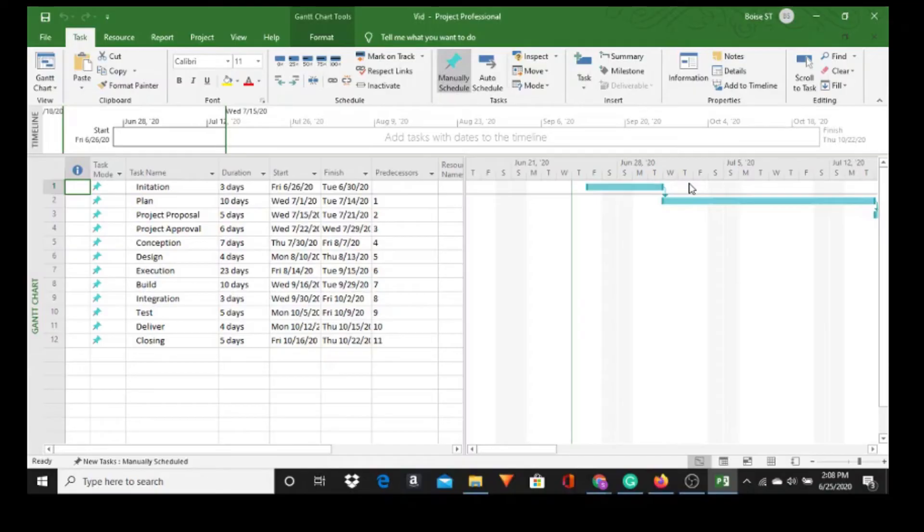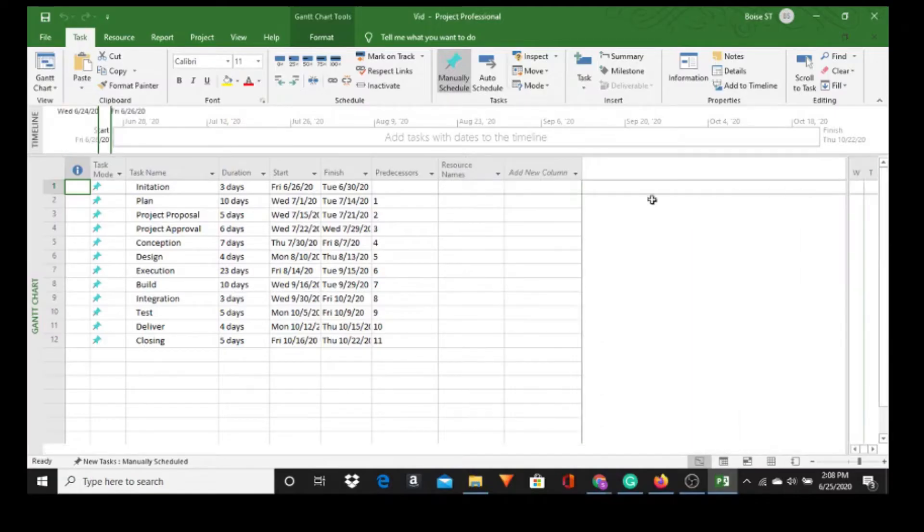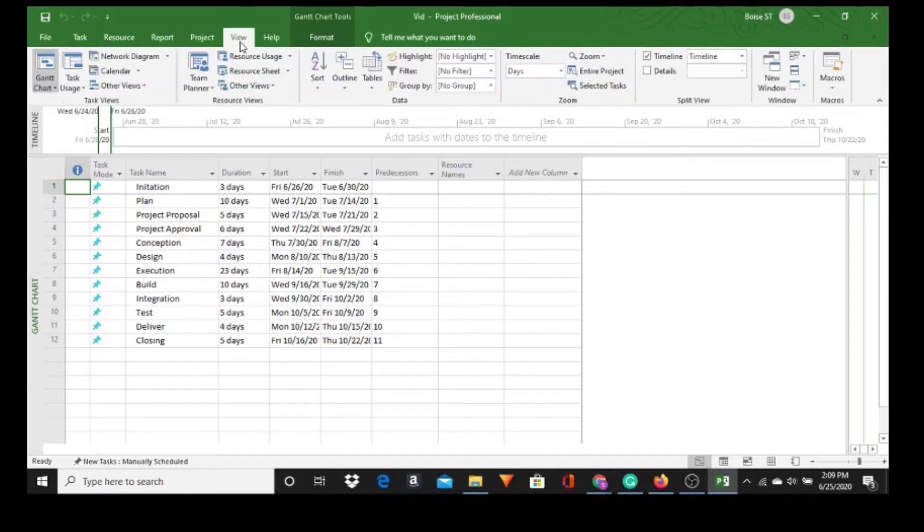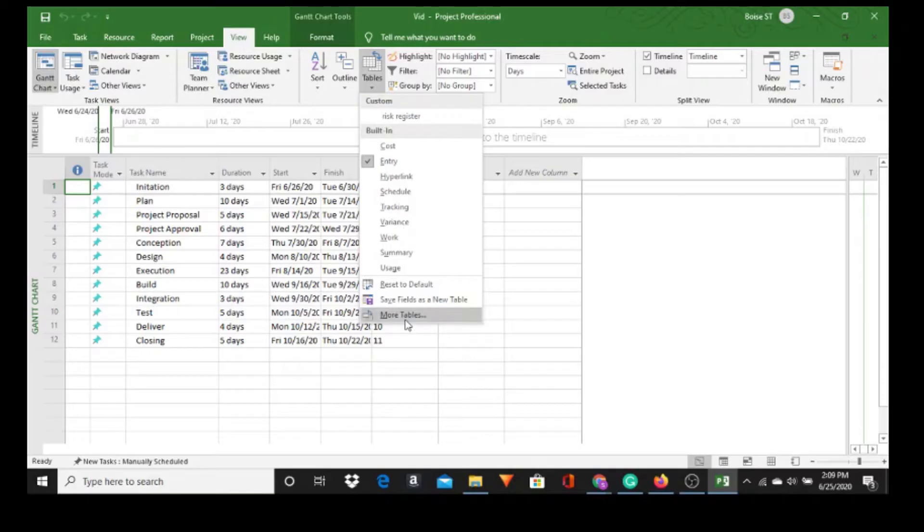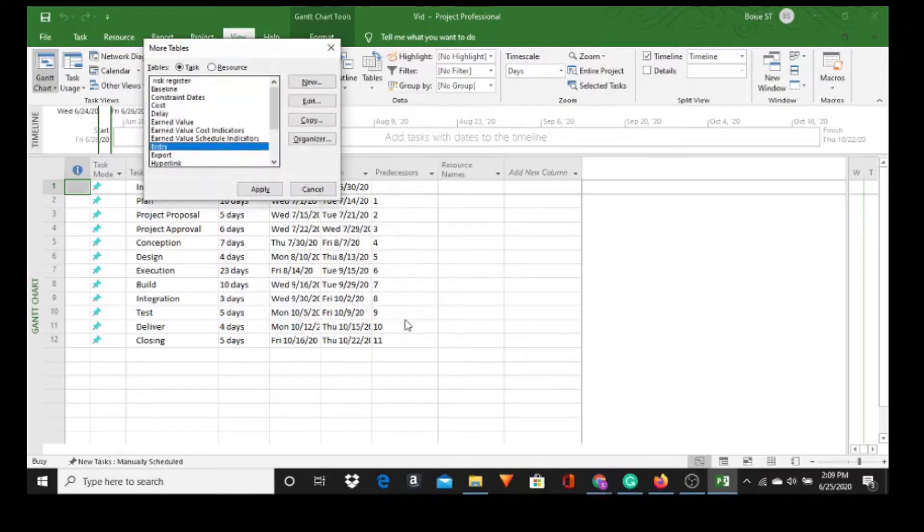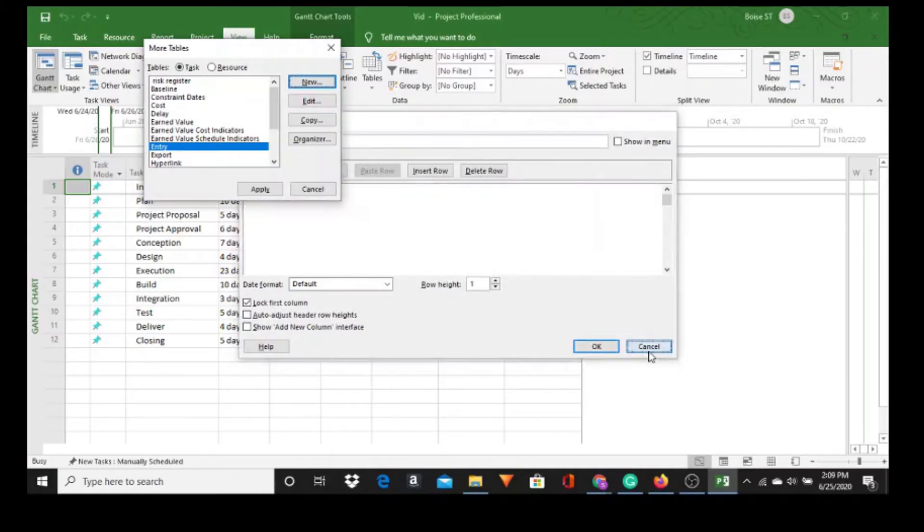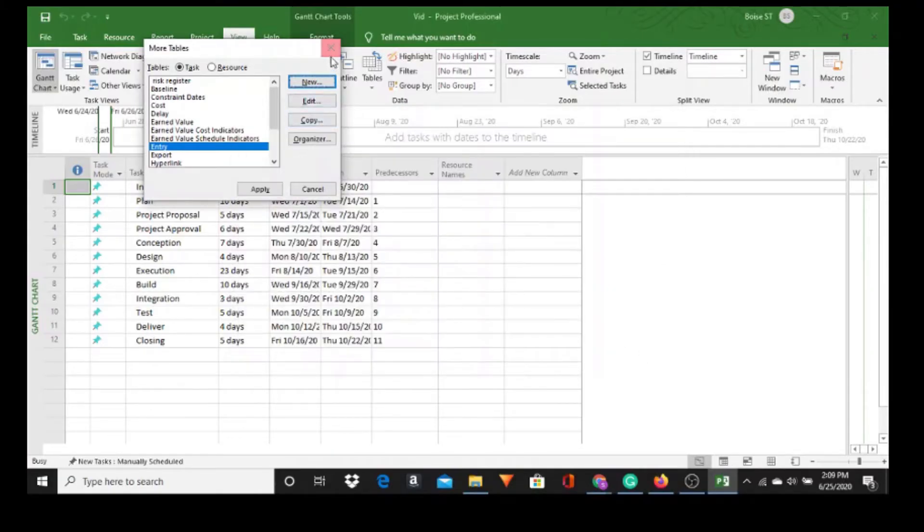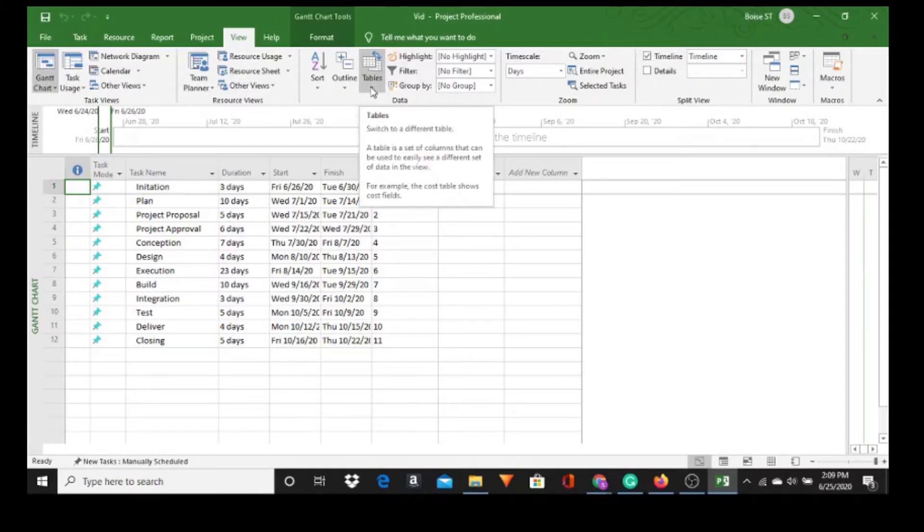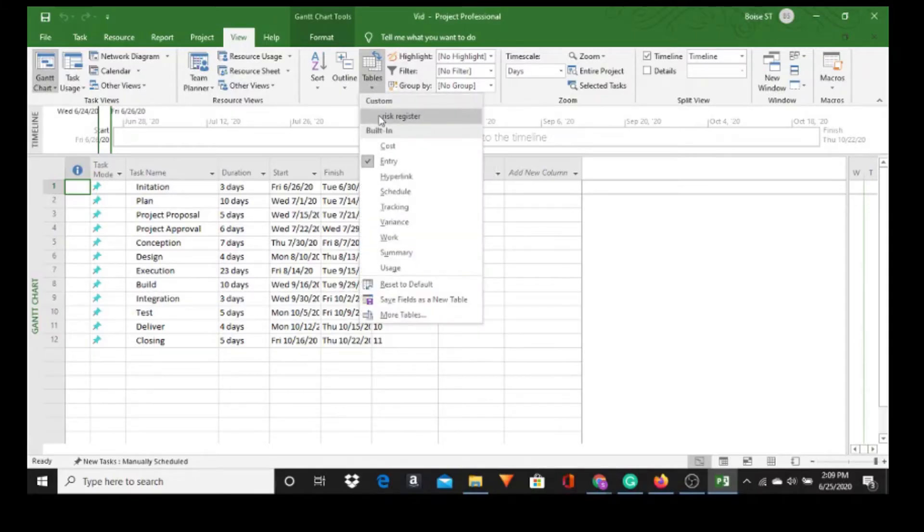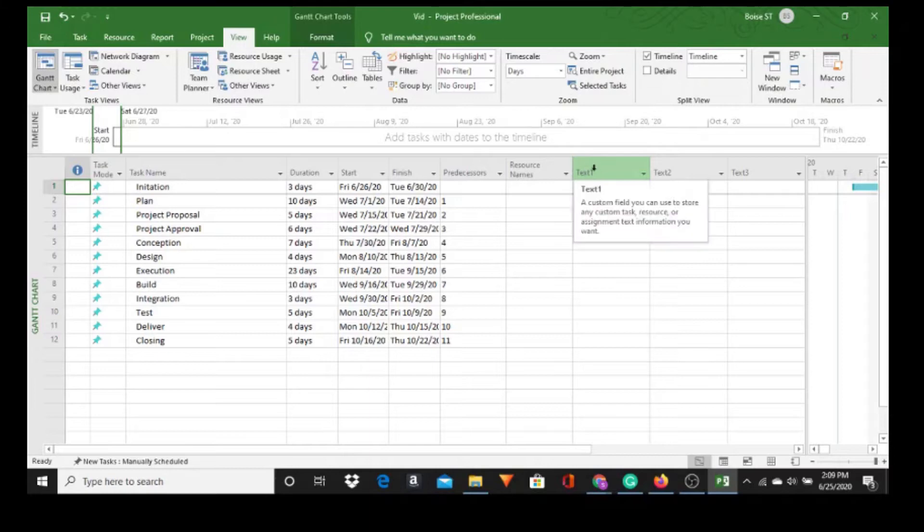Here we have a simple project in Microsoft Project and today I'm going to create a risk register. I'll move this over here a little bit. Go to View and I'm going to create a risk register. Now I've already done this before so it's going to show up in my list. If you don't have one, go to More Tables then New, call it Risk Register and click OK. Since I already have one, I'll go to Tables, Risk Register.